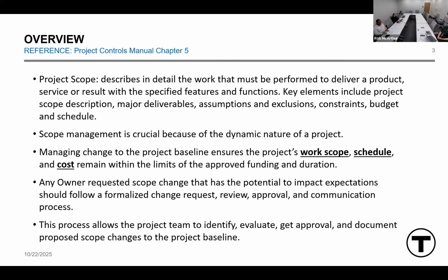So if the project is in construction and there is a change condition, that is not one that is required to go through this process. This only is for an owner, one of the stakeholders, requests some change that is not part of the original scope. For example,